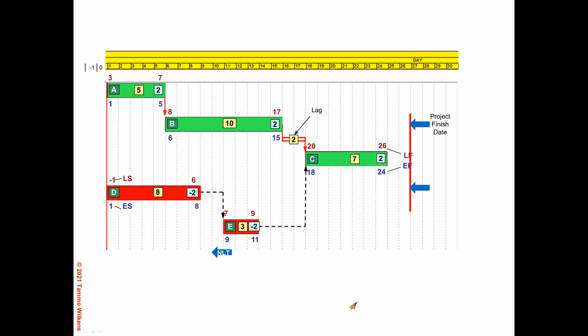So here we have the longest path, which is not critical. It does determine the project finish, but it is not critical. So right here you can see that PMI's simplistic definition of the critical path is simply not correct in all situations.